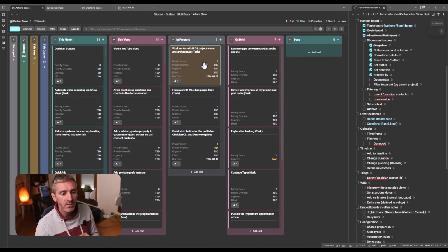Another thing you can do is create relationships between different nodes inside of the board. So let's say that you have tasks and that you have dependencies between tasks. Let's say that you have to do A before B, and so B depends on A, and A is a blocker for B. So these are relationships between tasks. Other types of relationships include parent and child. So if you have a project, then that project can have as parent a goal, and if you have a task, its parent can be a project, and vice versa. So we have this notion of relationships.